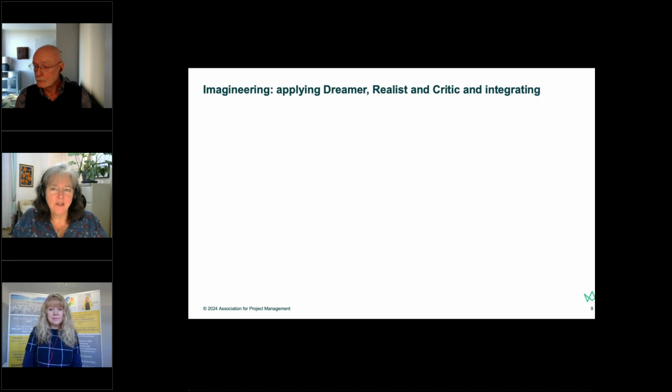So getting very real and very current, in the present moment, and also redefining the potential quality of deliverables. We've all had the discussion as project or program managers: if costs can't change and time scale can't change, then there's one thing that may well have to change, and that might be the quality of the deliverable.